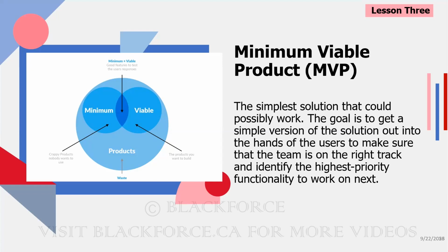Immediately gets them thinking, okay, so if they could deliver only 10, of course, they're going to select the 10 most important ones, right? If there is a time constraint. So again, the general idea of the MVP is not to build a shabby solution and say, oh, don't worry, we'll perfect it later. No, the MVP still has to work. It still needs to meet their need. They need to have all the functionality that they need in that MVP. They're not going to have the extras.